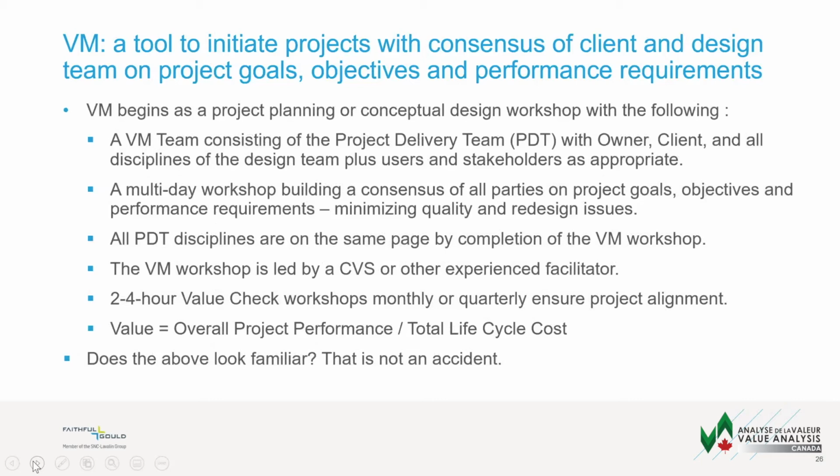The VM workshop would be led by a CVS or other experienced facilitator. It could be somebody in-house who is familiar with the job plan. 2 to 4 hour value check workshops would be held monthly or quarterly to ensure the project alignment. And finally, we'd be going after value as the overall project performance over the total lifecycle cost. And if the above looks familiar to you, as our previous slide, it's not an accident. That's exactly what we're saying.